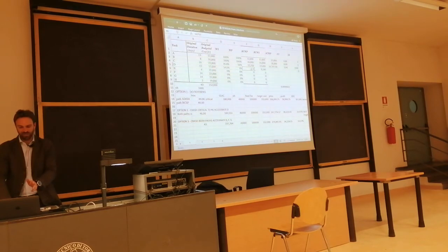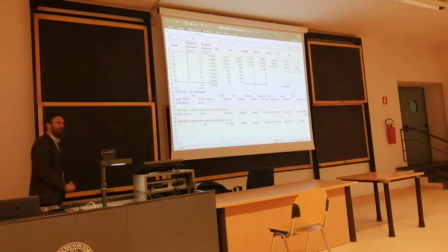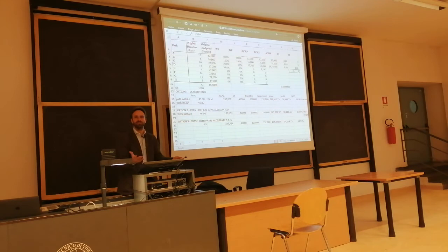For D, the earned value is 0 over 9, so there's no cost index because the activity has not started yet. But we are very late. We are experiencing a schedule index of 0, because the activity has not started yet, but it should have started. All right?